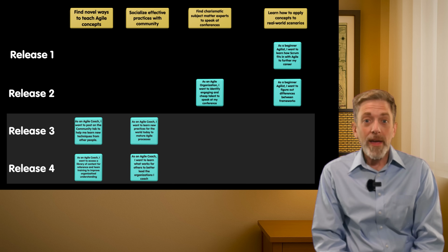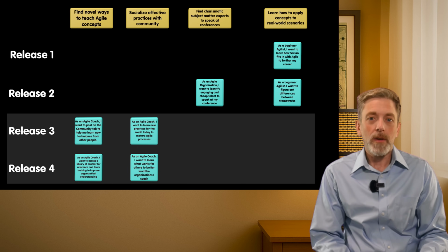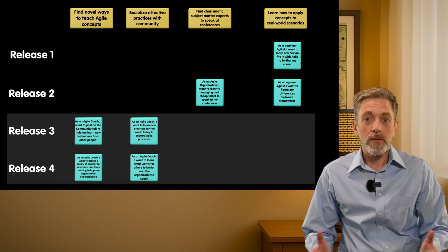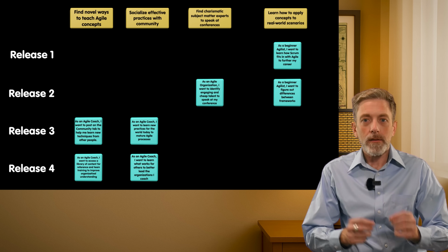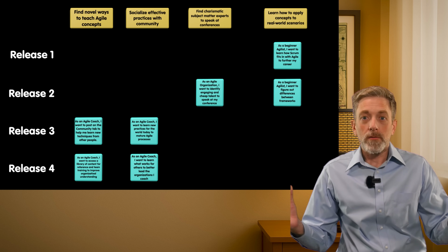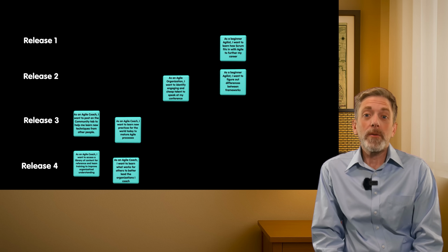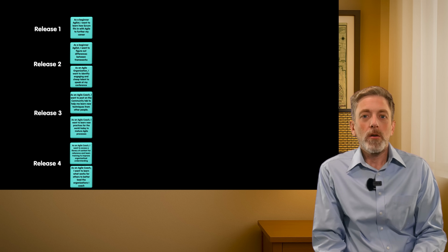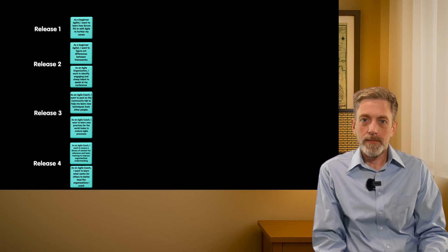So the main thing to take away from this is that when you have independent user stories in the backlog, you can mix and match them in a release to give multiple personas a little bit of functionality each time. Like putting together little Lego bricks, and over many iterations, it builds into something with a lot of value for each persona. So now we can take the user stories and move them into our product backlog, ordered such that the first item on top is the first one that needs to be done.